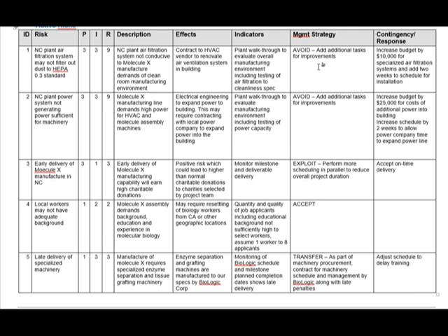We're changing the project to do something to avert the danger of this risk becoming an issue. We're going to increase the budget, and we're going to add 2 weeks to schedule for installation. And in our project schedule, we also add a trip out to the manufacturing facility by the project team to investigate the air filtration system.